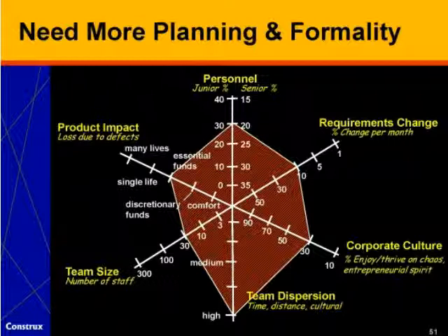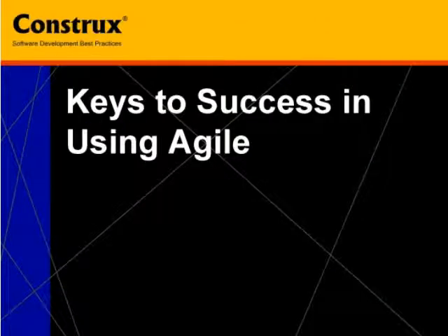On the other hand, if you have a lot of junior personnel, you have low requirements change, your teams are spread out through the world, and they're large, and the impact of error is high, then that really calls for a lower use of Agile practices. So I'd like to summarize now by talking about keys to success in using Agile.